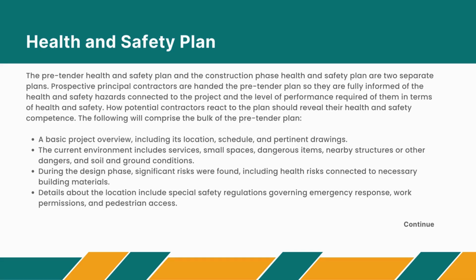A basic project overview, including its location, schedule, and pertinent drawings. The current environment includes services, small spaces, dangerous items, nearby structures or other dangers, and soil and ground conditions. During the design phase, significant risks were found, including health risks connected to necessary building materials. Details about the location include special safety regulations governing emergency response, work permissions, and pedestrian access.